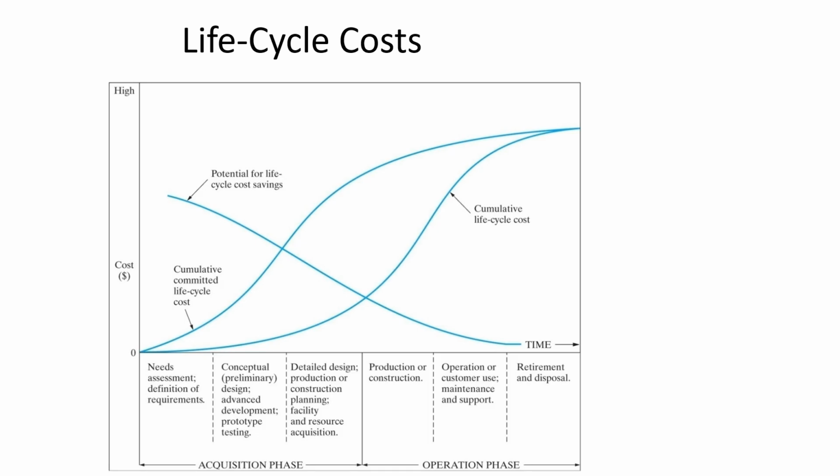Like, that's a huge dramatic effect on the cost of the building if you refine the needs and figure out that it could be smaller than people originally thought. You're going to save loads more money than if you get locked into the big building. From there, it's going to be harder and harder to economize because, yeah, you can put in cheaper carpet and you can use worse paint and maybe you can buy cheaper furniture, but still, it's a big building that's going to have to be heated and cooled and cleaned and built, and all of those expenses are kind of baked in once you've made the decision on how big the thing is going to be.